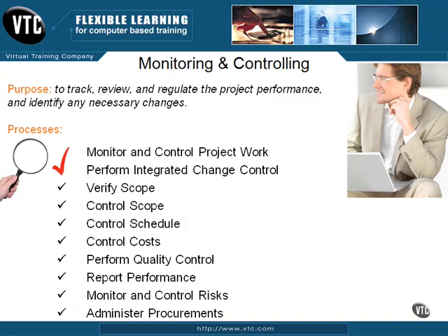All change requests are submitted into the next process that we'll touch on, the Perform Integrated Change Control process. Here, the idea is to control factors that create change. We want to make sure that a change control board formally reviews and then approves or rejects changes with the best interest of the project in the forefront. This helps prevent things like scope creep and is meant to keep the project properly on track.